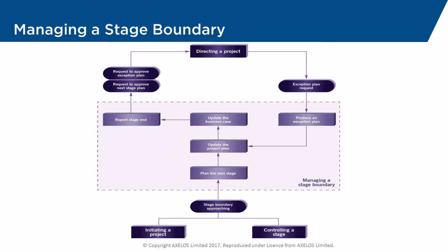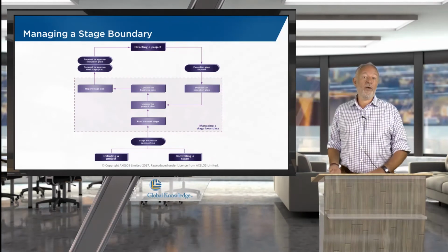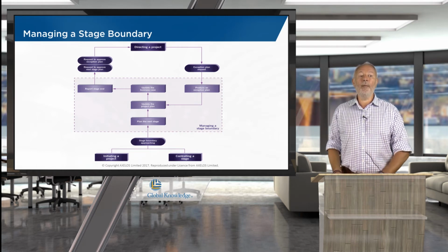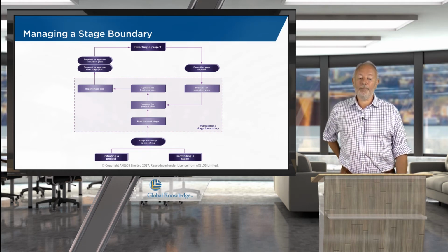As a result of updating our project plan, we may also need to update our business case. So at this point in the project, it's perfectly possible that our time and cost may have changed as we've learned more about developing the products. Additionally, our risks may have changed. But more importantly, have our benefits changed? So over a period of time, maybe a number of months, perhaps circumstances have changed within the organization, and therefore, is the project still viable? So not only have we written a next stage plan, we've updated our project plan, but we're now updating, if necessary, our business case.